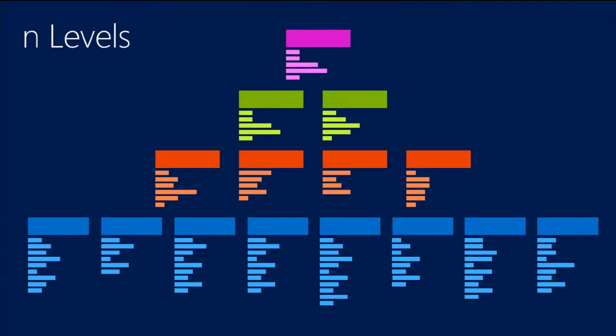Internally, we have 4 levels. Well, really 3 levels. We have scenarios at the top, experiences, and stories. Those are our 3 levels that we use. And then we break our stories down into tasks. So I'm not really including tasks on here. But I'll show you how those look as well.